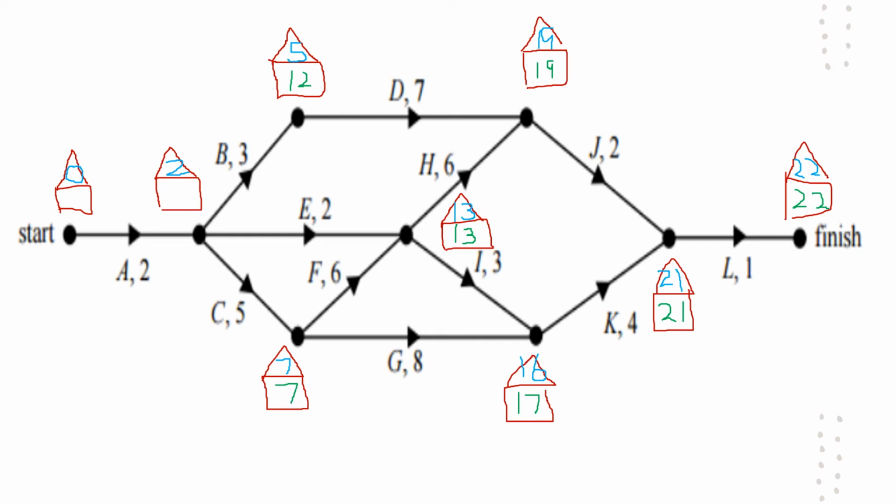Got a few options coming into that house with a total of 2 on its roof, so I've got the 12 take 3 is 9, 13 take 2 is 11, or 7 take 5, which is 2. I'm going to go for the smaller number. And finally, 2 take 2 is 0. So you should definitely finish on 0. If you haven't, we've done something a little bit wrong.